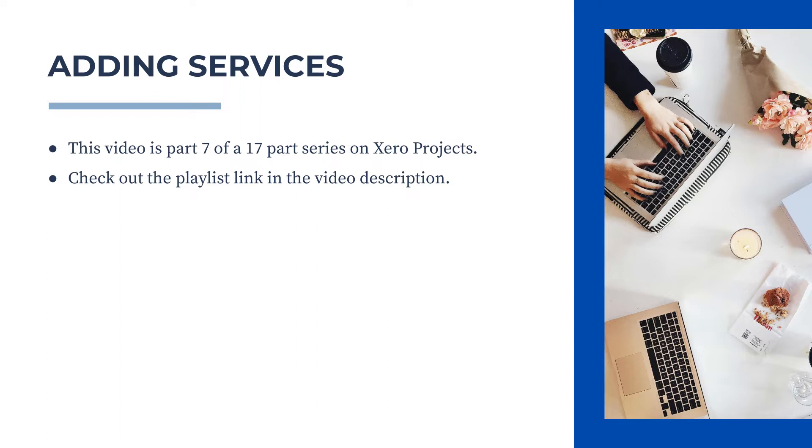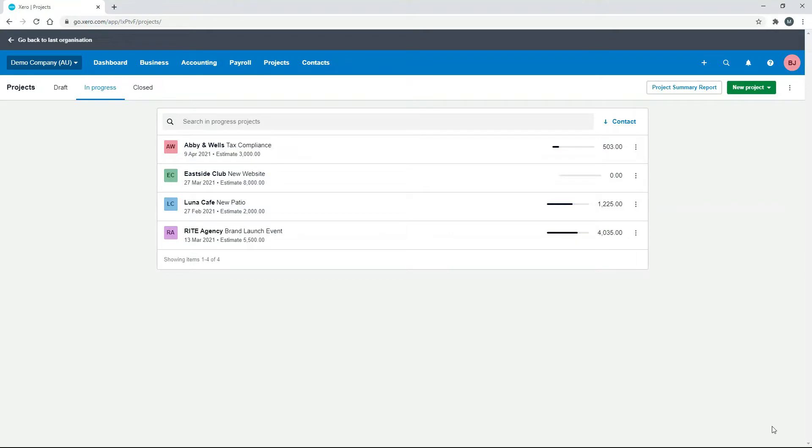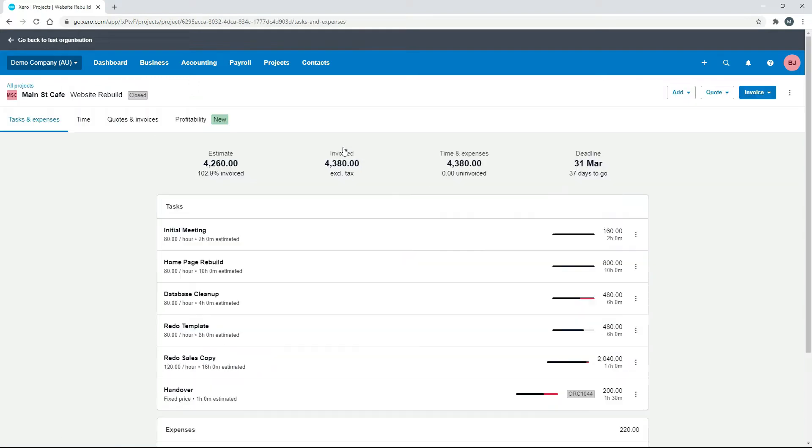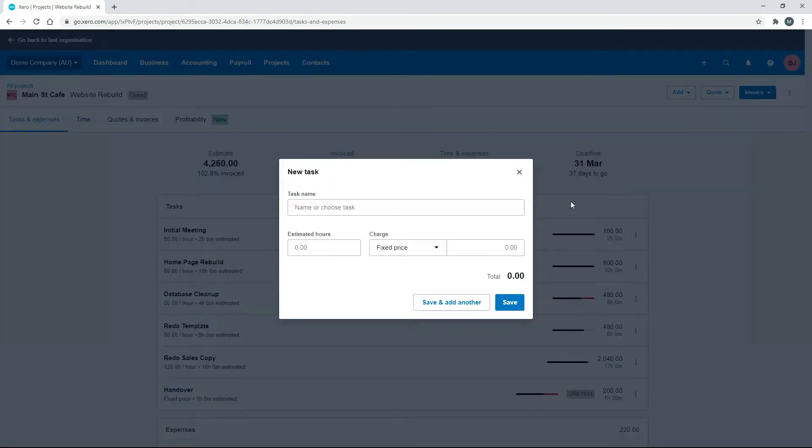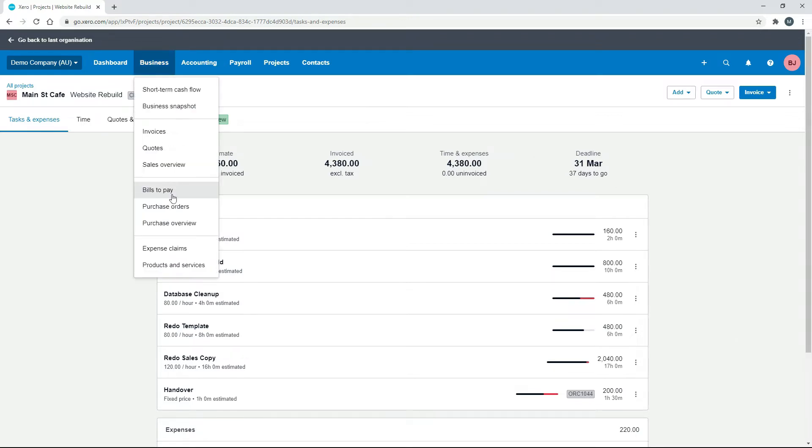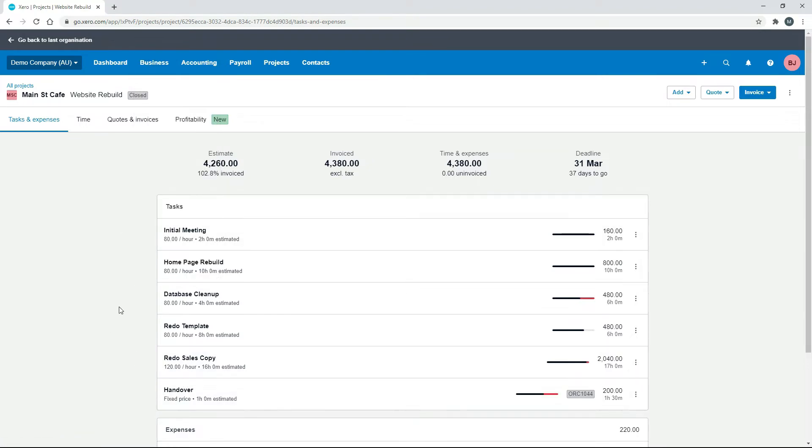Okay, so let's jump into Xero now and see how it's done. When we were adding tasks before into our website rebuild project, we clicked on add and task, and then we had to put all of the details in. So if you had certain tasks that you did over and over again for different projects, you can set them up in products and services, and then you can bring the information through to your projects.